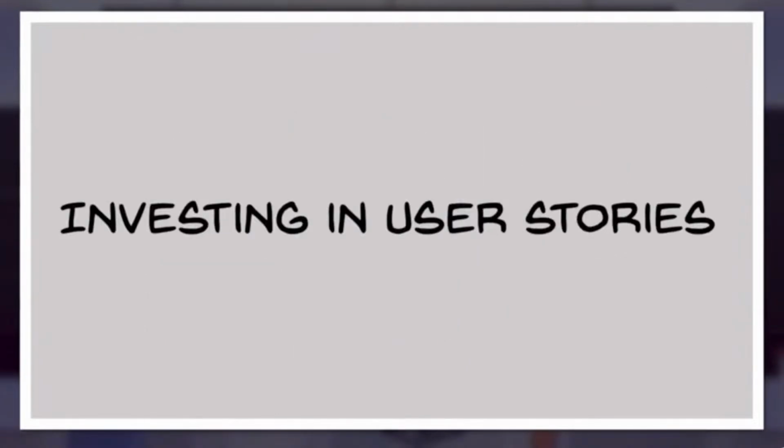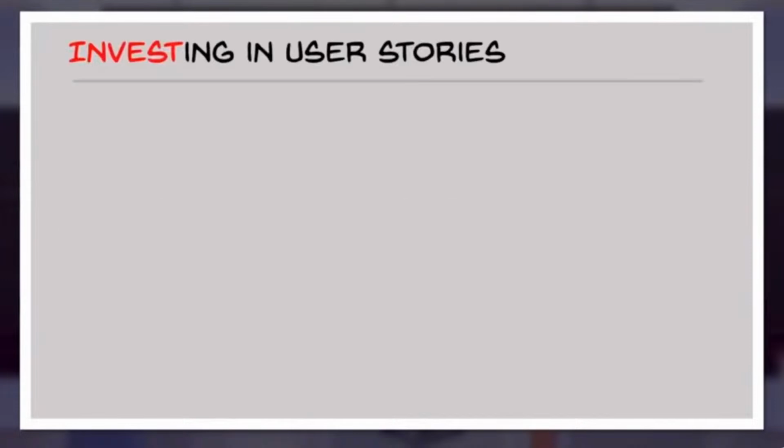Invest in user stories. So what is INVEST? What does investing in user stories mean? It is a concept that helps in creating meaningful user stories. It stands for independent, negotiable, valuable, estimable, sized appropriately, testable.